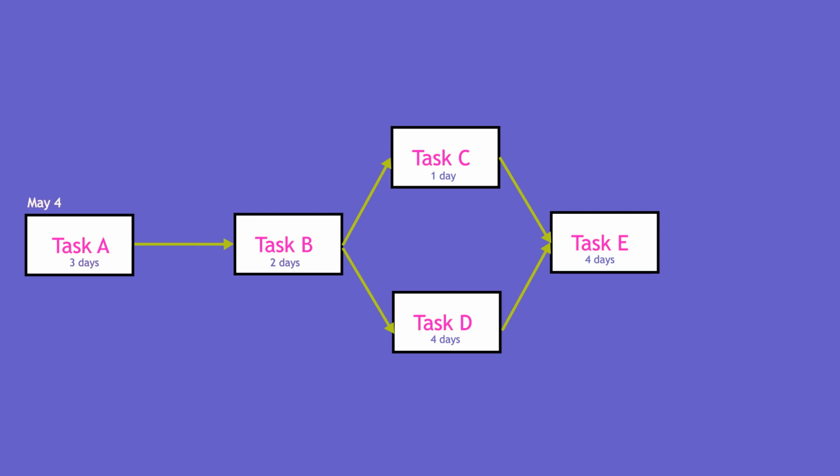With the first activity's start time and knowing the activity's duration and working time calendar, the scheduling engine can calculate when that activity can finish. We call that date the early finish date. Next, the engine then follows the relationship arrows and runs the same calculations along every path. But what happens when there is more than one incoming path? We use the later date because we're trying to find the longest path.